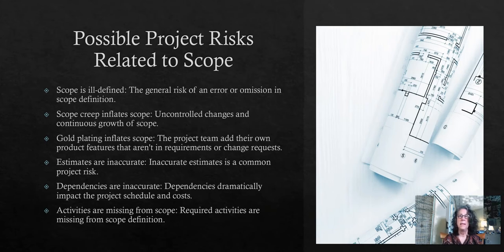Gold plating and scope creep were definitely risks for this project, as the individuals who were participating in the initial gap analysis sessions with the vendor saw that as an opportunity to go ahead and insert things that were really coming from their pent-up demand regarding the existing system. They saw that as a great opportunity.